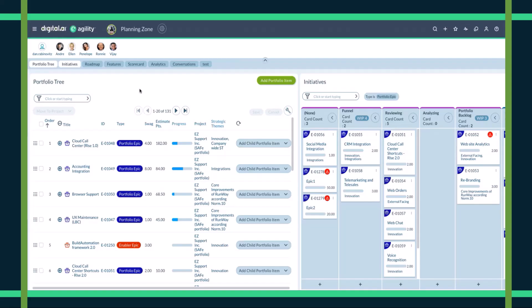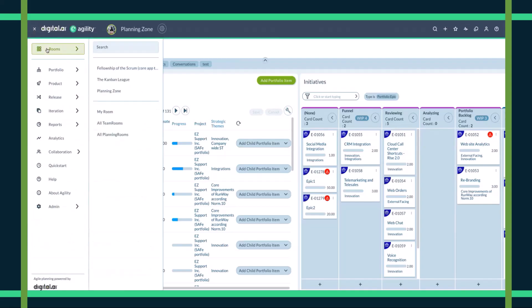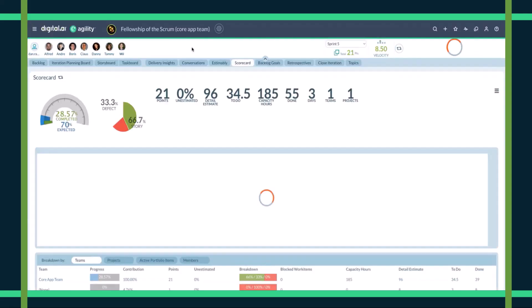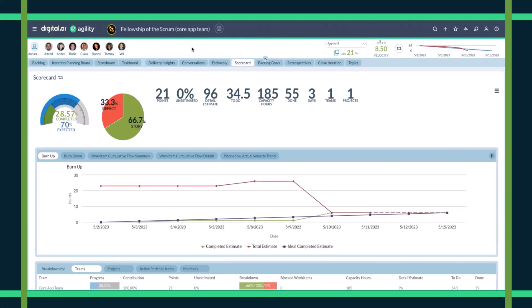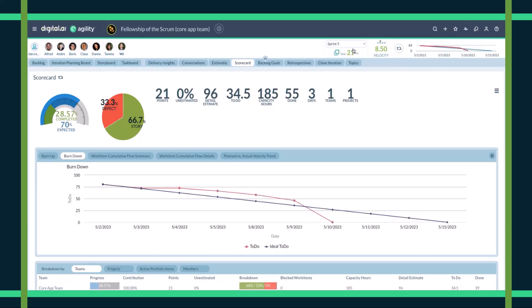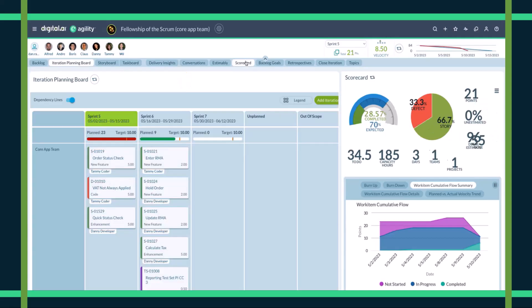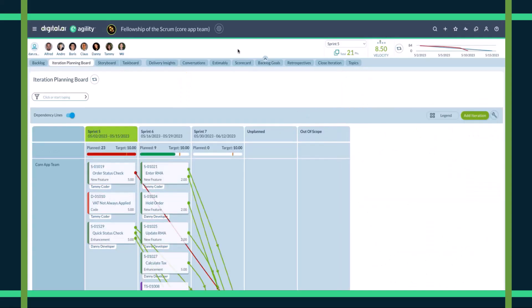Now that we've seen how release train engineers and program portfolio managers can leverage a room, where are our end users going to be actually doing the work? Well, we have a room for them as well. This room is geared towards a scrum team — I can see things like various sprints, velocities, and burndown charts over the course of that sprint. Team members, along with scrum masters or coaches, need to view work sprint over sprint, and we have an iteration planning board that helps. As a team member, I can move stories from sprint to sprint if I have to, or I can work on them and edit them across this as well.